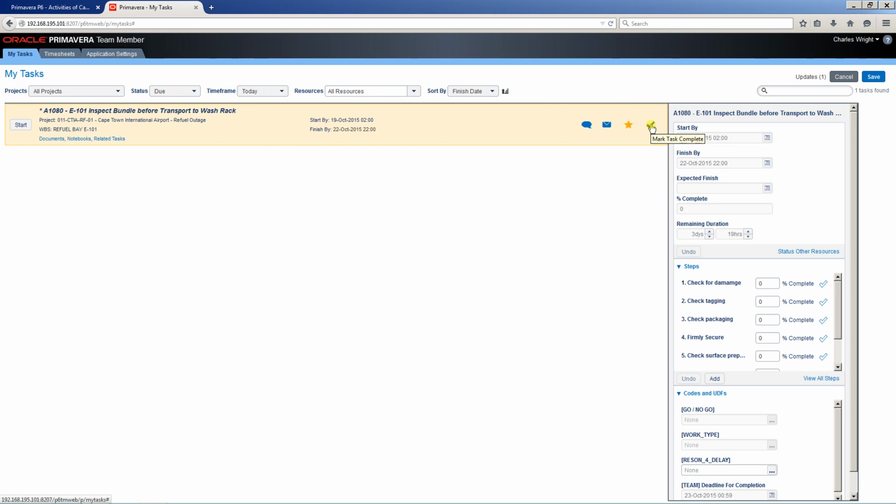I can mark this as complete. If it's not complete, I can mark this started by, finished by, expected finish, percent complete, and what's remaining. This is the most important.